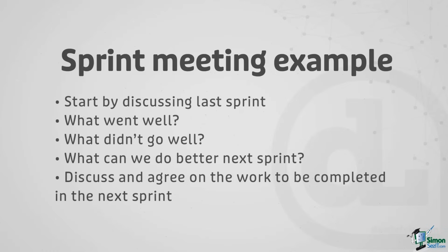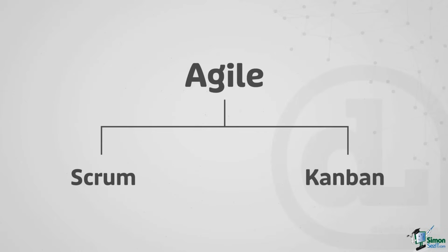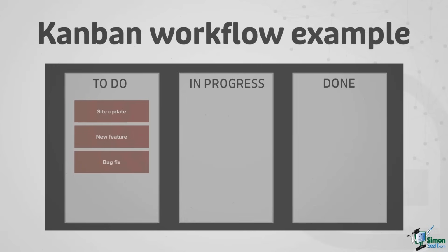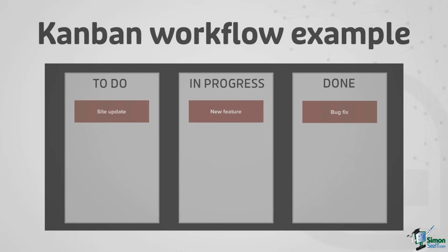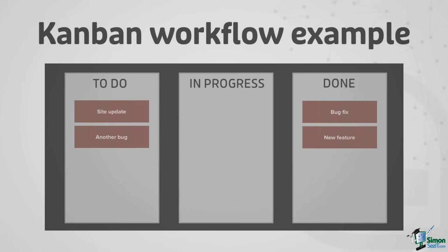Now, with that said, not every team works best with these blocks of time for their project, with these sprints. Sometimes it might be better for your team to work on projects on an ongoing basis, and that is where Kanban comes into play. In a Kanban workflow, the boards may look very similar, but the workflow is going to be different, where you take your ticket and you drag it over. Again, you're still going to try to get that all the way to completion if you can, but as you're working on things, new issues, new tickets may be added to the board at any given time.